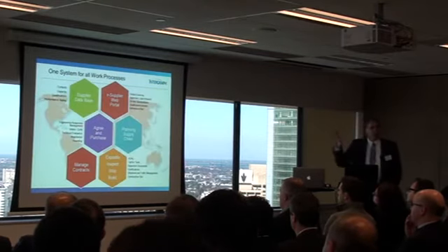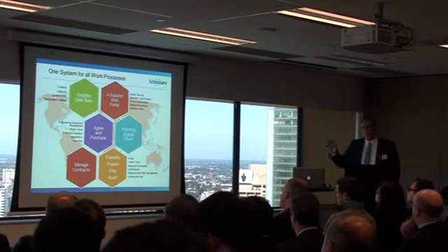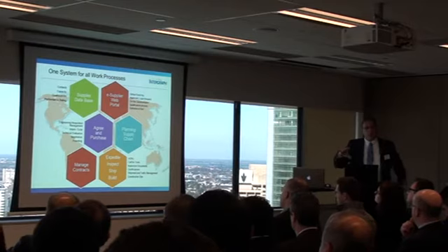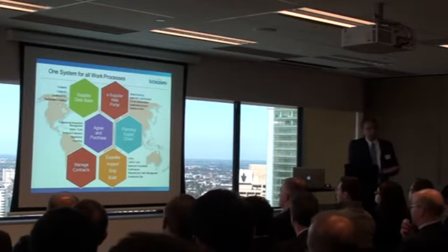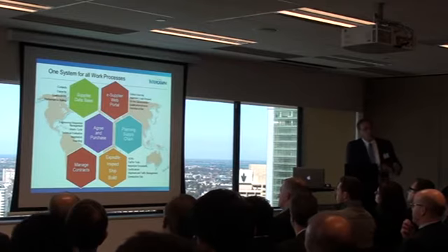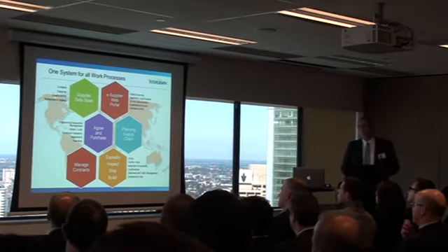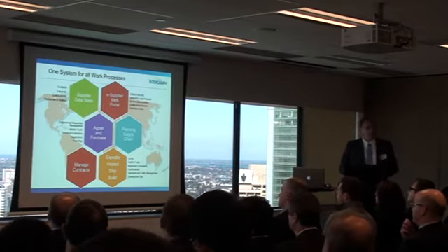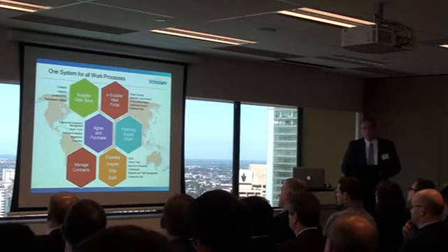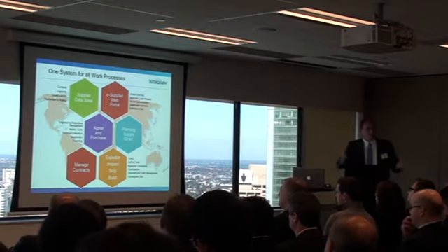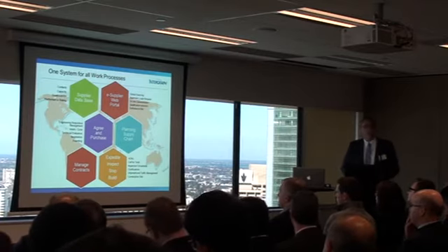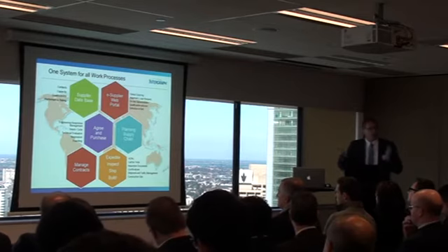So this is a normal process. When I talk materials management, it's about the whole process. It's not just procurement. It's the MTO phase, bill of materials, the requisitioning phase, the whole purchasing phase, but then also the whole construction phase, warehousing, and then giving the material to the crews, and then seeing how much is left. Do we need to reorder, and all this. So it's a whole process.